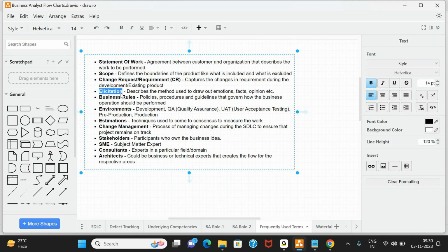And some of these decisions, like I said, as a business analyst, you will not be taking any decision on your own. Even if the customer is asking for a change, you will go back to your development team and testing team and discuss with them how complex the change is. If you all agree, if you three agree that it's a very small change, it will not derail us from our project timelines, we can still finish our work within the given timelines.